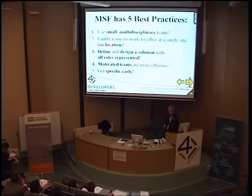So, MSF is using 5 best practices. Which is the first one? Use small, multidisciplinary teams. When you hear small, how many team members? Actually, the maximum is 10. Right, 5 or 6 is actually what MSF says, 6.